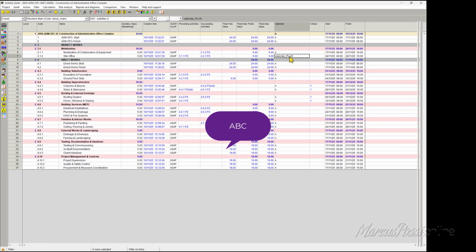If you plan in CPM without using resource, you may apply special calendars to your activities. But if you plan with resource, the constraint is not the activity. The constraints are calendars, number of people, number of equipment, quantity of materials. They will be the activity constraints. That's okay for you, Joseph and Mamani? Yes, it's okay.